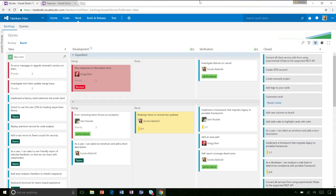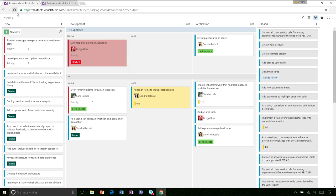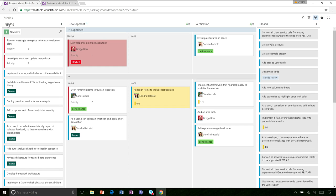We'll just jump into the demo right here. The first thing I want to point out is the board lives under the work hub. I'll go straight into full screen mode. The first column I'm going to rename to backlog, since that's really what it is. The backlog column is there for the product owner to reorder and reprioritize, and the team will focus on the work that's actively being worked on. They'll pick up the next item off the top and drag it into development when they're ready.